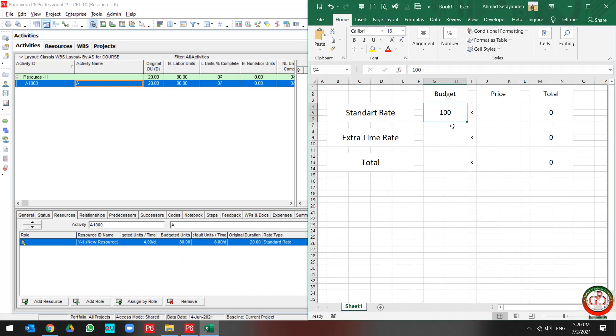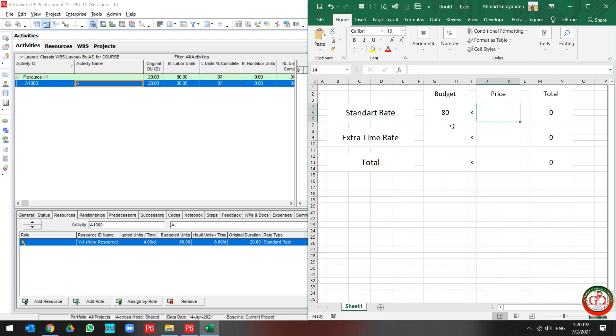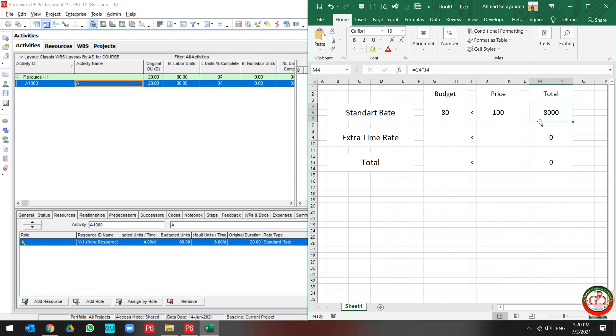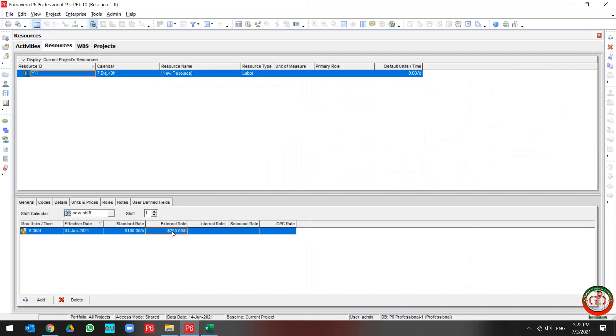My standard rate budget is $80. My price is $100, so my total price is $8,000. But maybe you need to use the external rate in your resource and project.